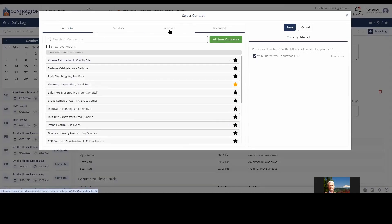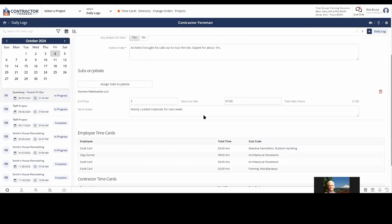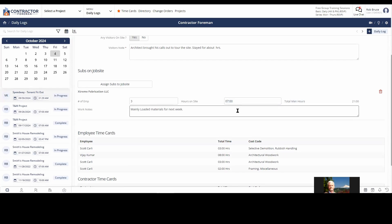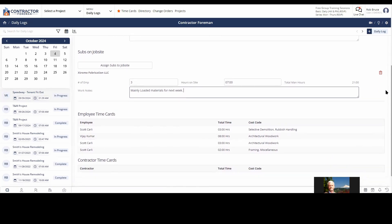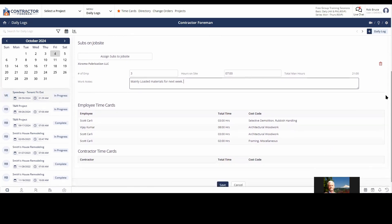So when we click assign sub, you're going to bring in, very simple to do. I just click, brings me up contractors. I can pick whomever. I just select who was there. Say number of employees. How many hours were they there? It automatically calculates your man hours and some notes about what they did. Again, remember, you might need this a year and a half from now. Your brain cannot remember what happened 10 o'clock on Wednesday, exactly a year and a half ago.